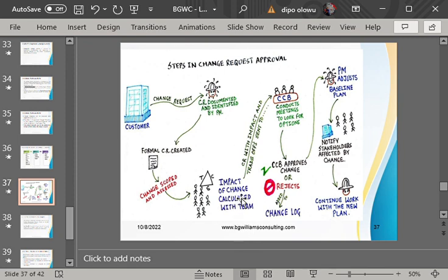So at that point, the project manager gathers that information of that impact that they have calculated. It takes the change request, you can see, with the impact that they have calculated, and takes it to the CCB. Remember, the project manager is a member of the CCB, but is not the head. So everybody in the CCB, the people in charge of the project, the ogas, will now sit down and look at that impact and also consider if they should accept the change or reject the change. Why? That will be their decision based on the impact. So if they don't have money to implement it, what will they do? They will change it now. And if they have money, they'll say, okay, since we have money, go ahead, we'll provide you the money.